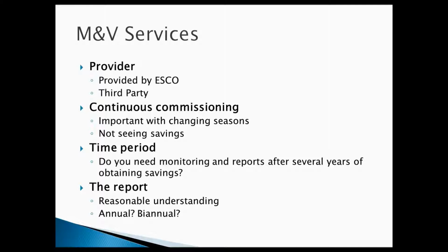But this whole building look is only going to be practical if the projected savings are relatively large compared to the normal variations that you're going to see in energy use, or else you're just not going to get an accurate picture of the savings you have.